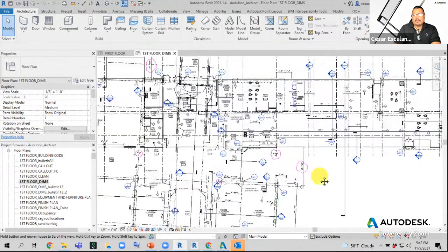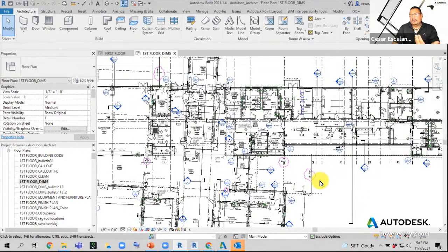And it will highlight its revision. It is used when enabling RFI processes or executing change orders from the client or executing bulletins or architectural supplemental instructions. And those revisions can be scheduled and tracked in Revit.